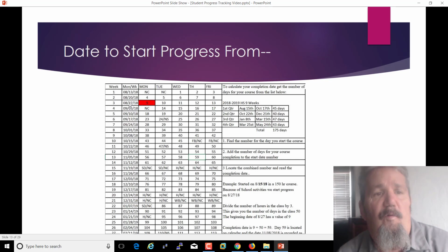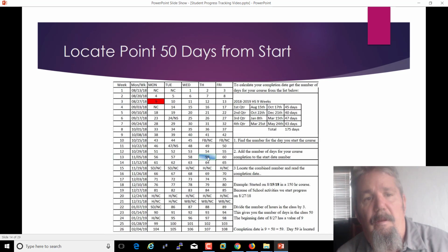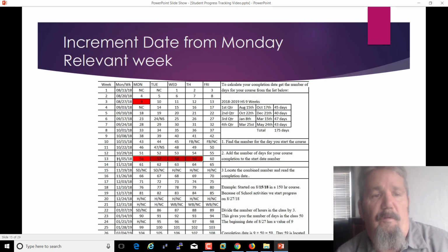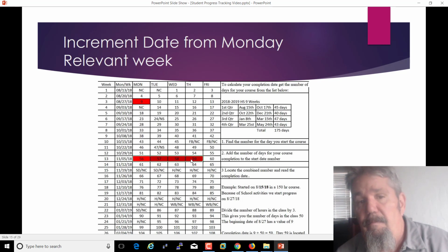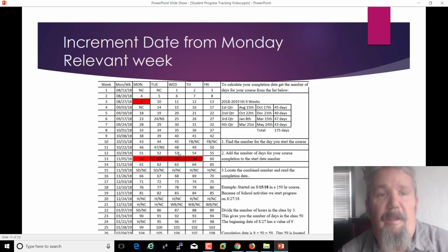Remember we said 8/27 was our start date. It has a value of 9. Well, we're doing a 150-hour class. Divided by 3, it's 50. So I add 50 and 9, and I get 59. This is the day that I should be finished with this class. Then I come over to the relevant week, which is 11/5. So 56 is 11/5. The next one is 11/6, 11/7, 11/8. So my end date is 11/8. It's pretty simple if you can add and divide.